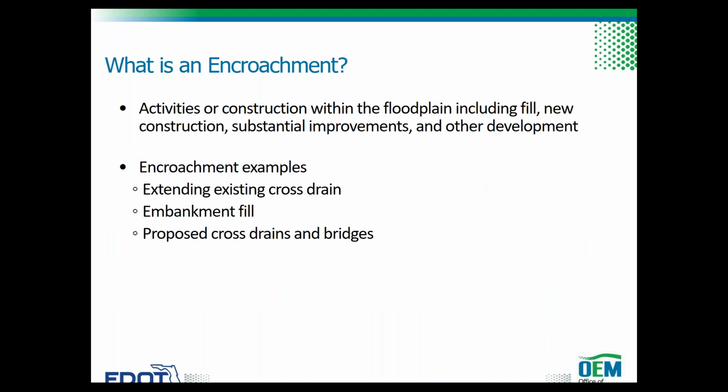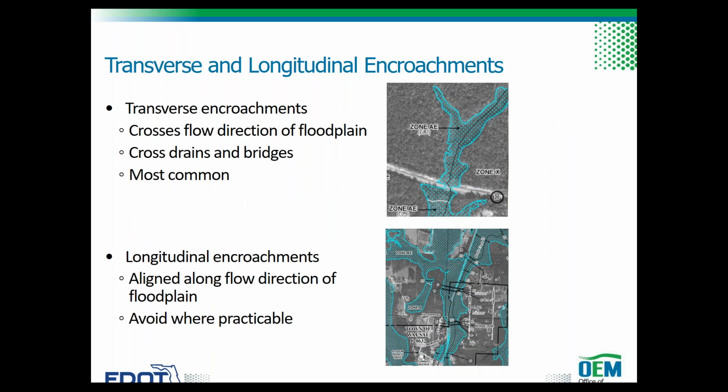A floodplain encroachment is defined as activities or construction within the floodplain including fill, dredge, new construction, substantial improvements, and other development. Improvements could be as small as extending an existing cross drain or small amounts of additional fill within the floodplain, or as substantial as new roadway alignments traversing several floodplains and conveying the base flood with cross drains and bridges. On roadway and bridge projects, encroachments can be transverse